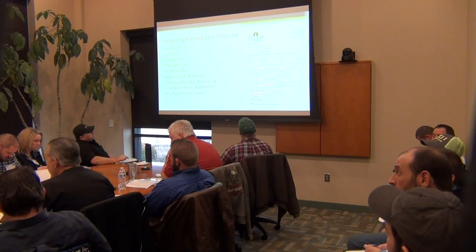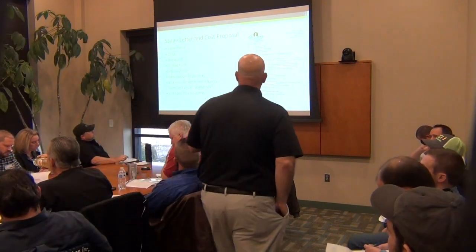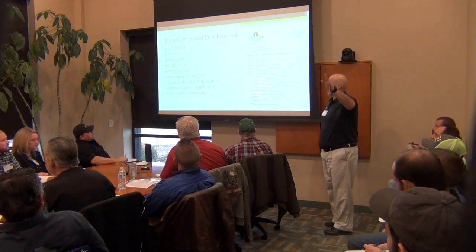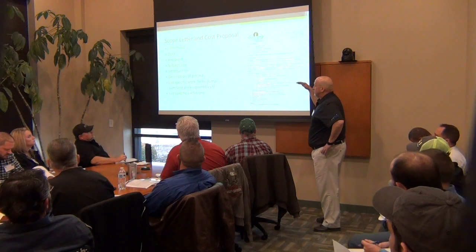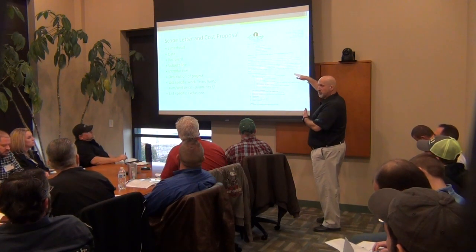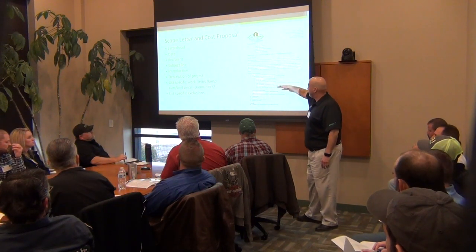One thing I didn't talk about, I guess, is sometimes you get into situations, this was a lump sum proposal. Anybody know what lump sum means? Right? You give them one number. Sometimes you may get in a situation where an owner gives you a bid form that's got breakout items, what we call unit prices, or other times they may want you to provide those unit prices. And this would be the spot you want to do that in your scope description.